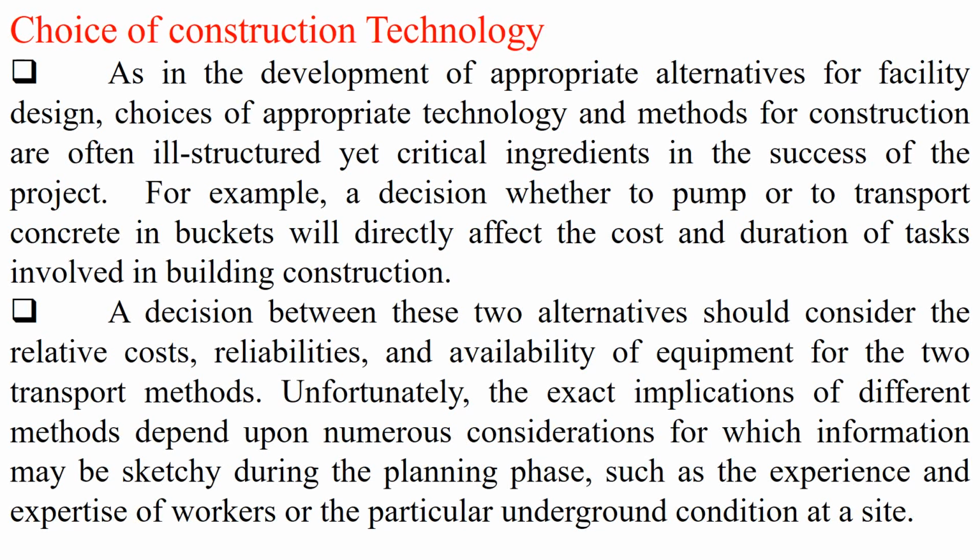See, I can give you another example. For example, transportation. If we can use the local available material rather than importing from a large distance, the transportation cost can be saved. So, the same example quoted here also: whether to pump or transport the concrete in buckets will directly affect the cost and duration of the task.